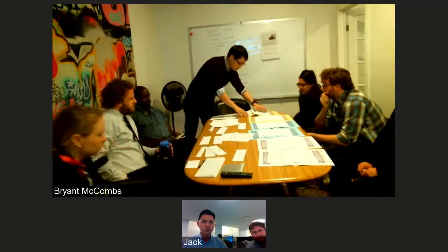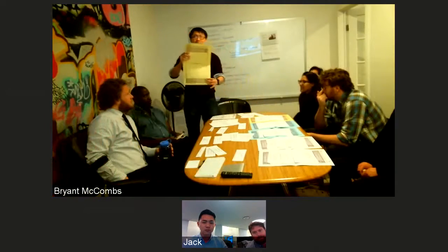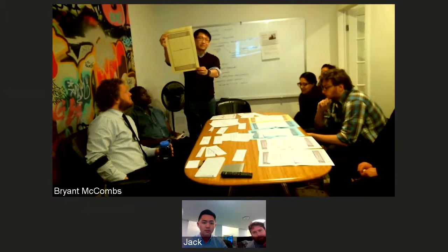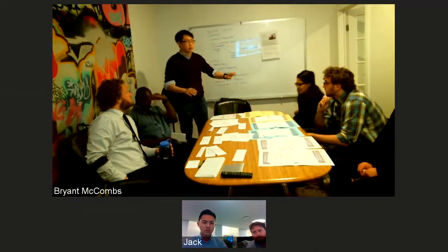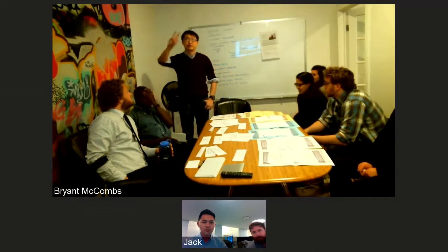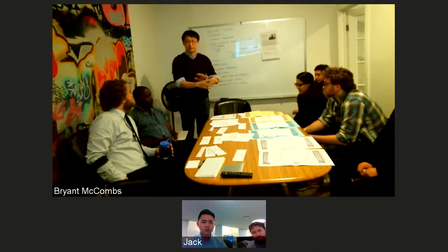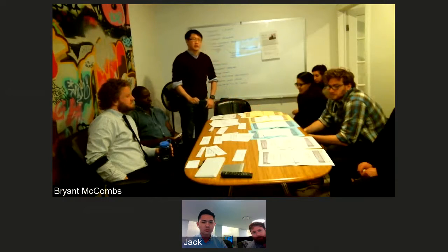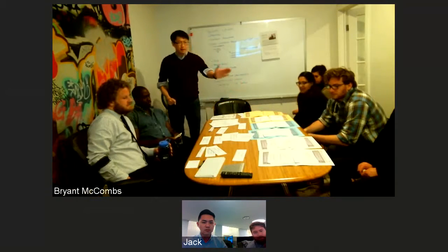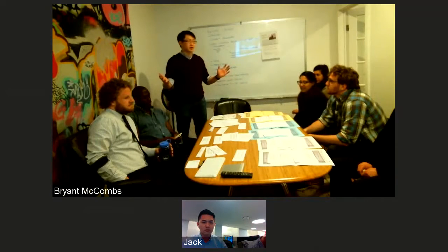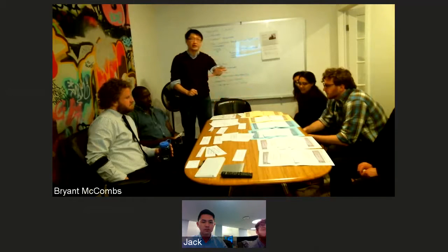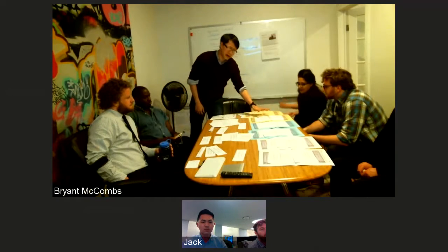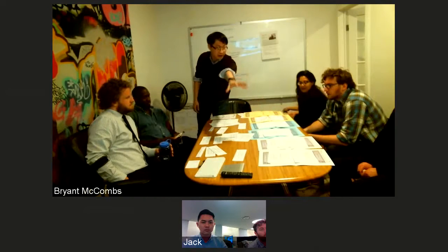That is because also in this room, where it can be seen by people, is your budget. These sheets of paper each represent, I believe in our world, $10,000 for a single week's worth of 2 developers. So 1 pair of developers for a single week, each of these $10,000. As you can see, this all laid out is a $60,000 project with 3 distinct release goals, color coordinated: an initial, a closed beta, and an open beta release.